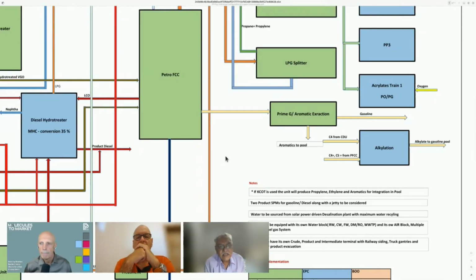And these licensors are also quite worried about their technology, so they come with some red-shirting clause and those kinds of requirements. So I think it becomes more or less pertinent that once you get into petrochemicals, the mode of implementation has to be different. One has to go through the technology selection process. Now, this impacts the project schedule and so many other things.